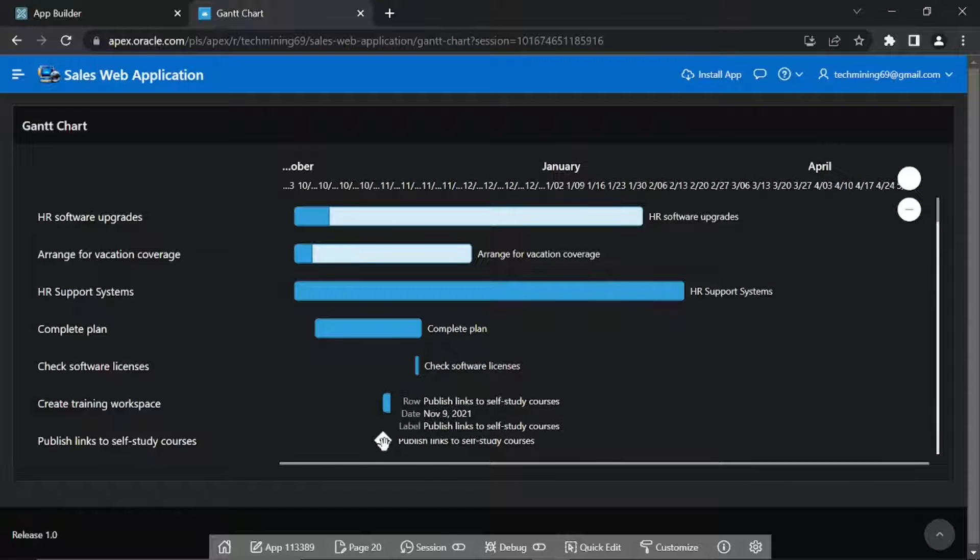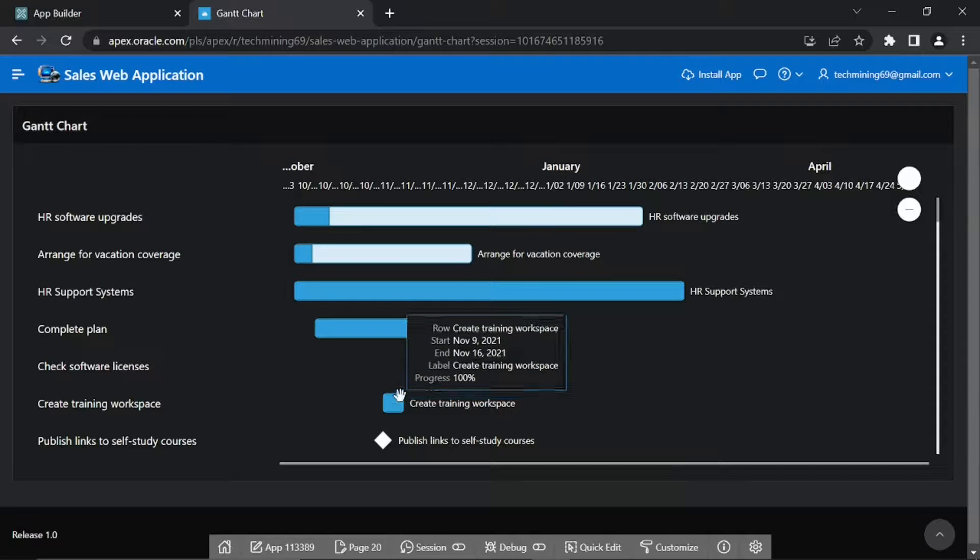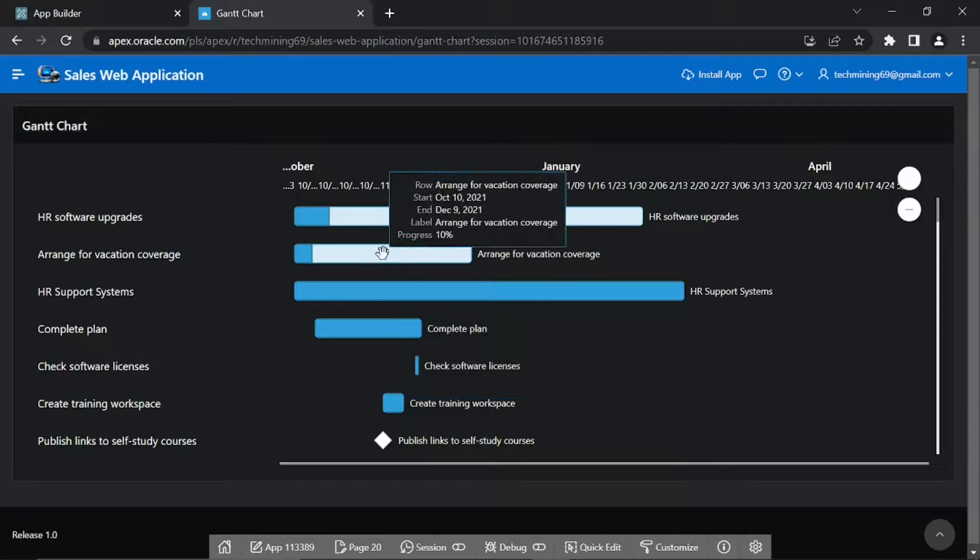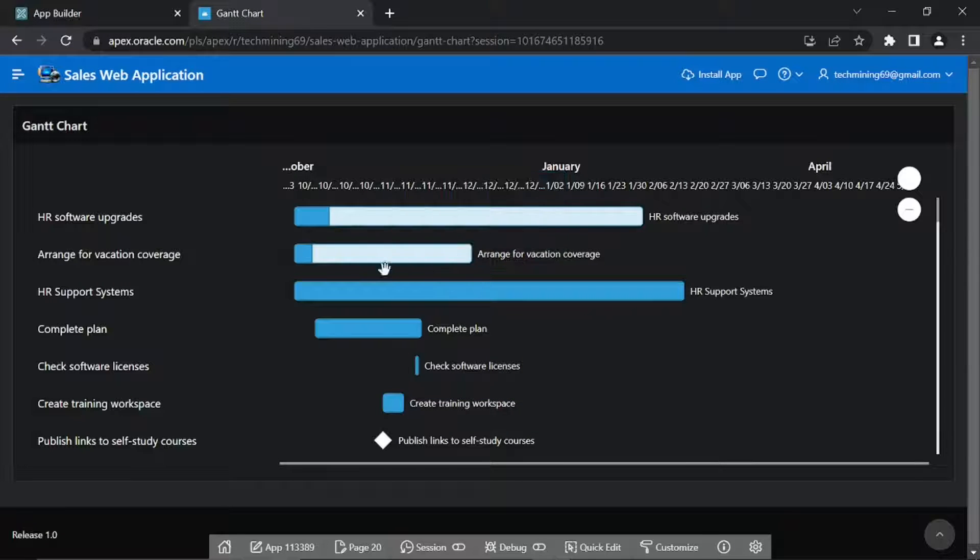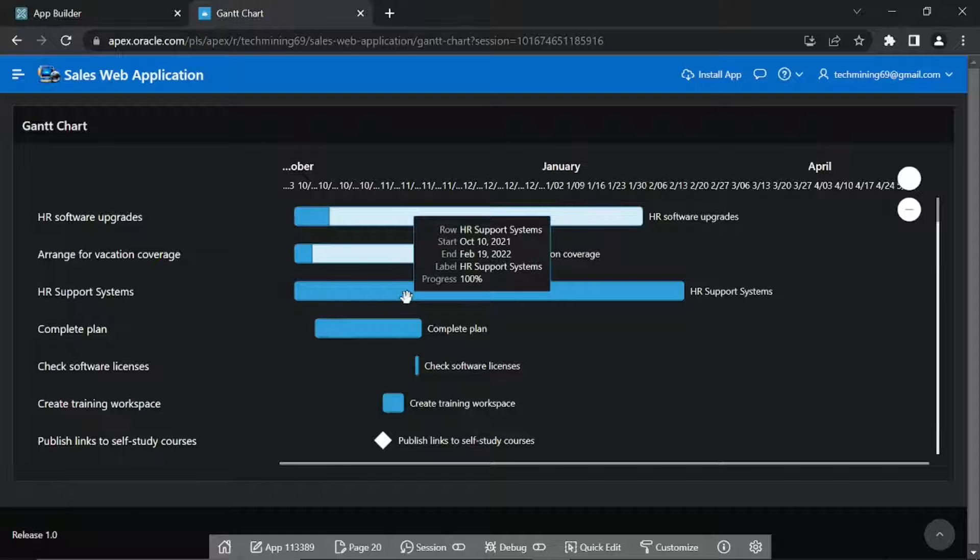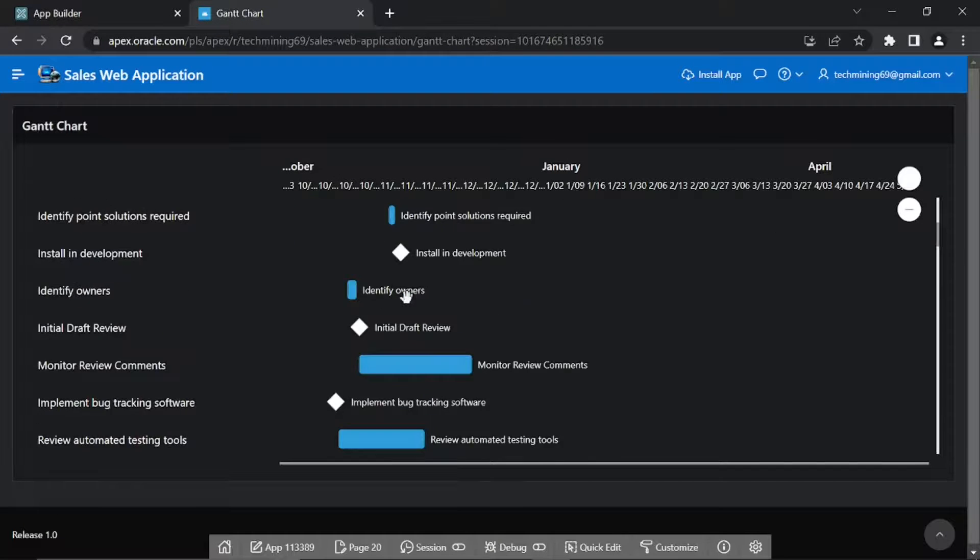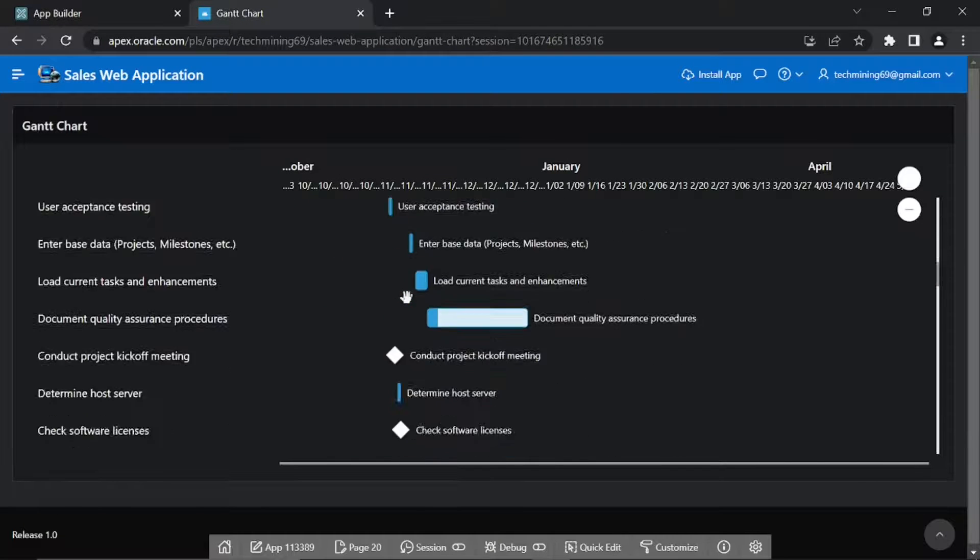Gantt chart starts by listing all the tasks you need to complete to finish your project. You also need to specify the earliest date you can start each activity, how long you think each will take, and whether any of them are dependent on the completion of other activities.